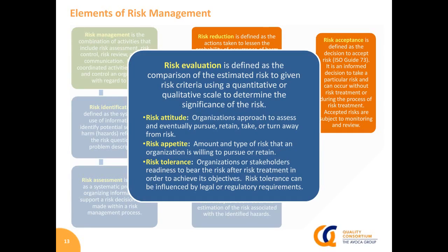So as an example again, let me say that if you are enrolling a critical path, phase 3 registration trial, the risk appetite and the risk attitude for a delay in enrollment in that critical path pivotal registration trial is probably going to be extremely low. This actually empowers the team, the project managers, and the other individuals on the team to elevate this risk or to escalate this risk in a very proactive fashion and argue that this has a high probability of happening, a huge impact if it happens, and as a result of that, we should get funding for extra resources or some other aspects to be able to mitigate this risk. And you'll be in an excellent position to argue your case because you understand the attitude and the appetite for risk up and down the organization.